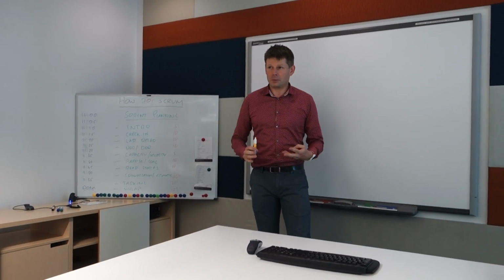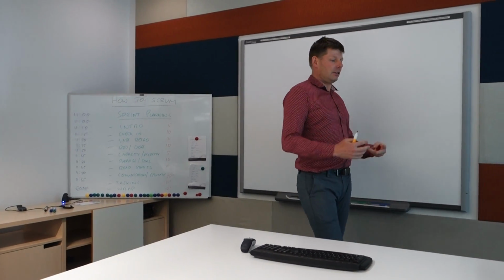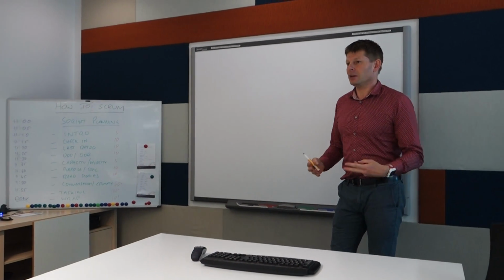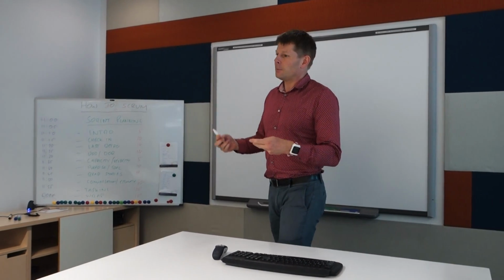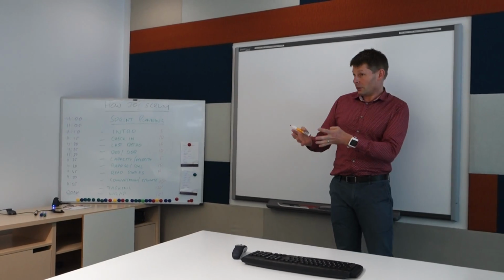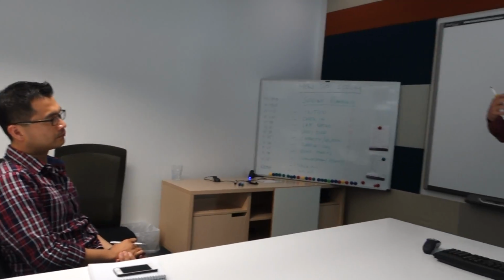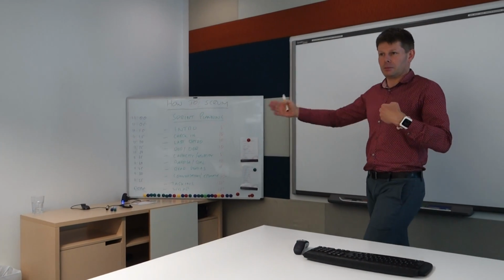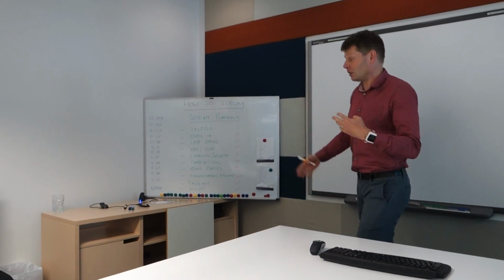So the purpose of a sprint planning session is it takes the assumption that you've done some backlog refinement and the team knows what's coming up. But the business, and you're the voice of the business, Ming, is you're going to present to the team what it is you want the team to look at for the next iteration, for the next sprint. So let's assume that's 2 weeks long. Actually, for this we will assume 2 weeks long.